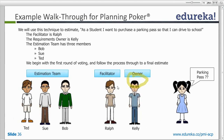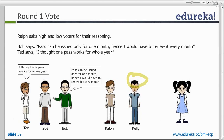When we begin the first round of voting, facilitator Ralph asks Ted, Sue, and Bob to vote based on the requirement. The estimation team can ask questions to the product owner or make their own assumptions. When Ralph says 'vote,' Bob says 8, Sue says 5, and Ted says 3. Ralph then asks Bob why he thinks it's 8 and Ted why he thinks it's 3.